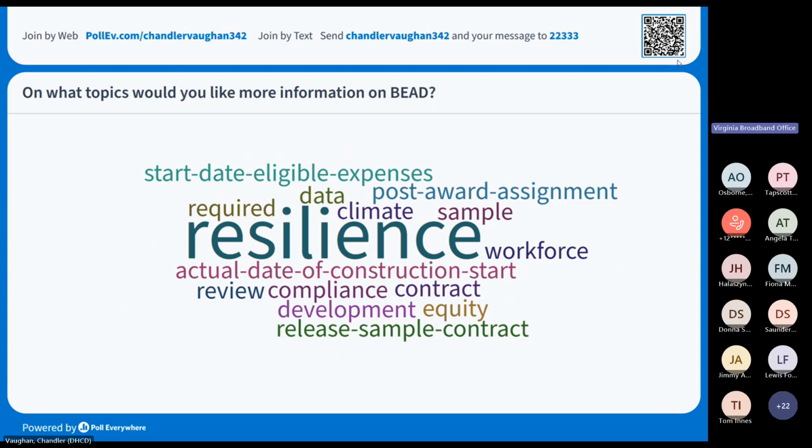There's a question in the room to that of whether or not that is a 4-year construction timeline. The maximum allowed timeline for construction of projects under BEAD is 4 years. If an applicant commits to 1 year or 2 years or 3 years in their response in the zip code portal, we're going to write your contract for that time frame.